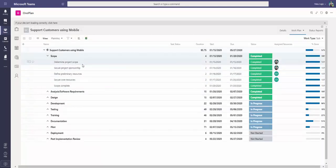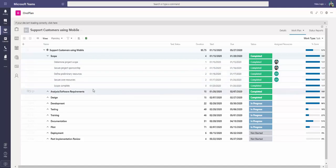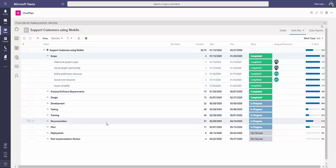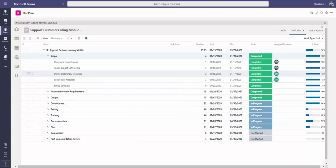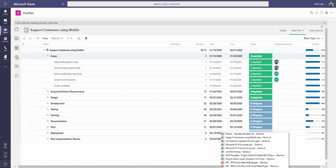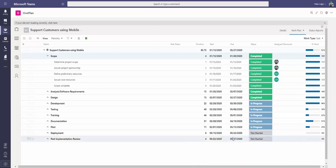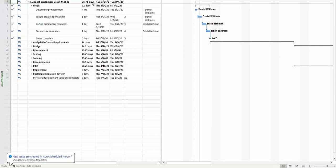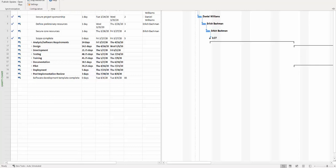But the visibility of that schedule is available to anyone who can come into OnePlan and see what the current version of the news is, including schedule information, who's assigned, the status, percent completes, etc. If you want to look at this from a Microsoft Project perspective, this is actually tied to a Microsoft Project plan. And that Microsoft Project plan doesn't necessarily need to be online, but here it is, the project plan that's here. And as you can see, there's a standard OnePlan connector that allows you to publish projects out to OnePlan and receive updates for changes that are made based on that plan in OnePlan itself.